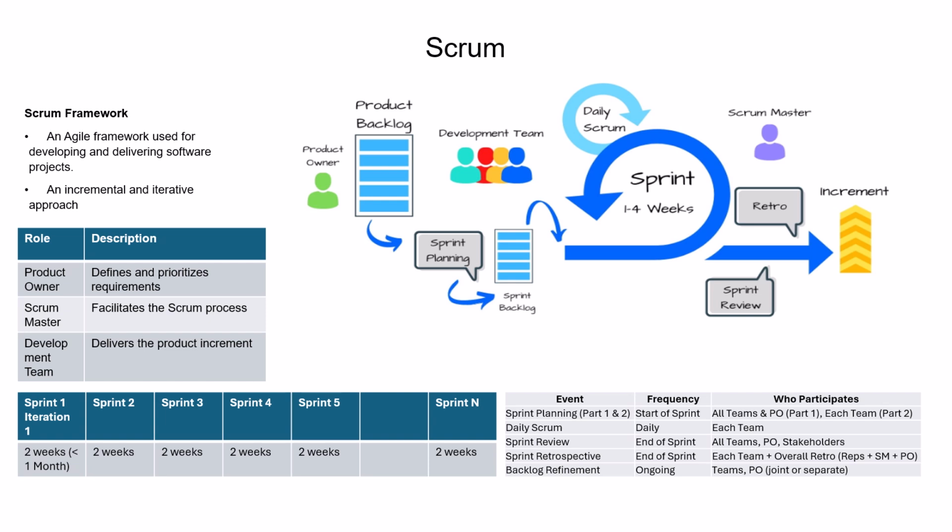And now after that, when we start a sprint, it is usually 10 days here. Although we say 2 weeks, which is 14 days, because of the weekends the working days are 10 days: Monday, Tuesday, Wednesday, Thursday, Friday, 5 days, and another 5 days gives you 10 days. So this is starting at the first day of sprint 1, for example.